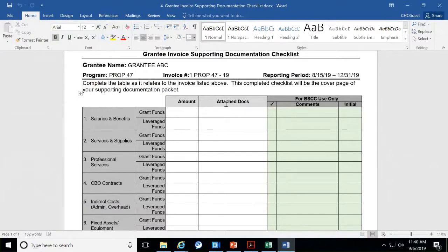When we request these documents, they are required, and this is just a small packet with the information and instructions in there. For instance, you talked about the salaries and benefits worksheet. That's basically just a cover page, and that's what we want with the desk review. But behind that, we understand that for all of those salaries and benefits, for the people you've listed there, you have on site all of the backup documentation: the timesheets, the timekeeping logs, all of the things that Ricardo will look at when he goes there. You keep that on site as a requirement for the entirety of your grant. But when we ask for this, it's just those pages that we ask for in the desk review packet.